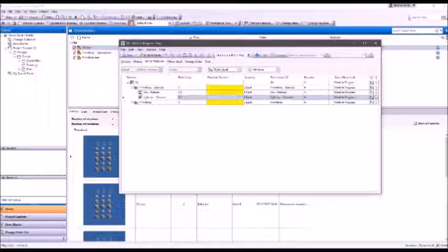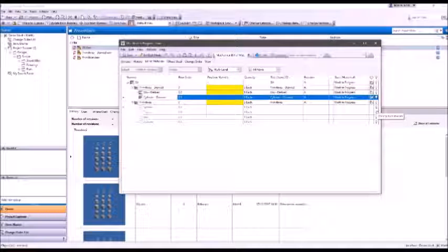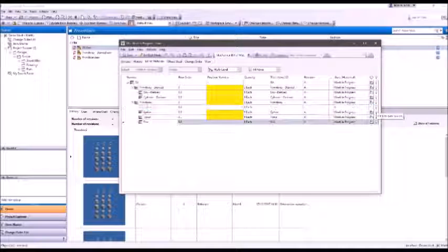This is the same list that we saw earlier on, the uses list. But in this particular case, it's telling me I need 1 of these, I need 3 of those, I need 1 of the other. So somebody not related to the CAD department, purchasing, can fire up Vault, log in, and see how many of what we need to order. We can find the long lead time components, look at the stuff we've got in stock, and by the time I've ticked everything on that list, we've ordered enough of everything, and we can then go and manufacture it.